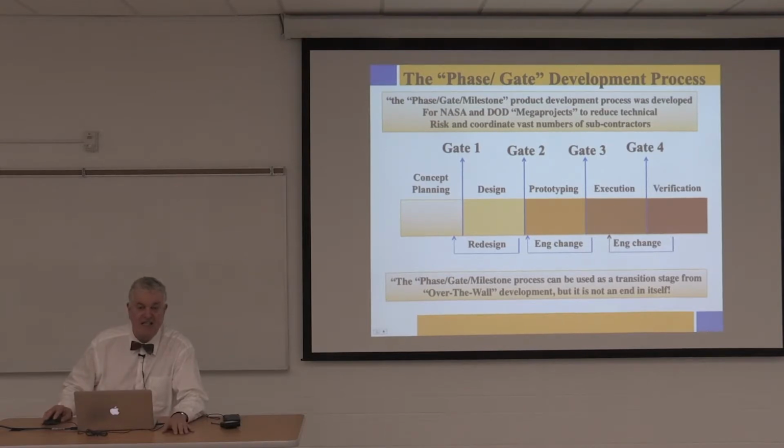There's the whole concept of the phase milestone or phase gate process. Now you'll also hear about a concept called the stage gate process, and that's from a fellow out of McMaster University in Canada called Dr. Cooper. He came up with this stage gate, which really focuses on fast-moving consumer goods. So, toothpaste, food products, products that consumers use. It's not used at all in heavily engineered products like aircraft, military aircraft, weapons systems, automobiles. It's not used in those kinds of huge engineering-driven projects. That's usually called the phase milestone process, and that's been around for decades.